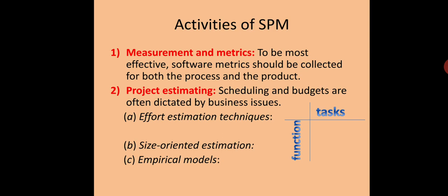Now, all software project estimation techniques require that the project should have a proper scope, a fixed and definite goal, so that estimation becomes very easy. With something vague, you cannot estimate correctly the time and cannot estimate the cost of a vague or undefined scope.